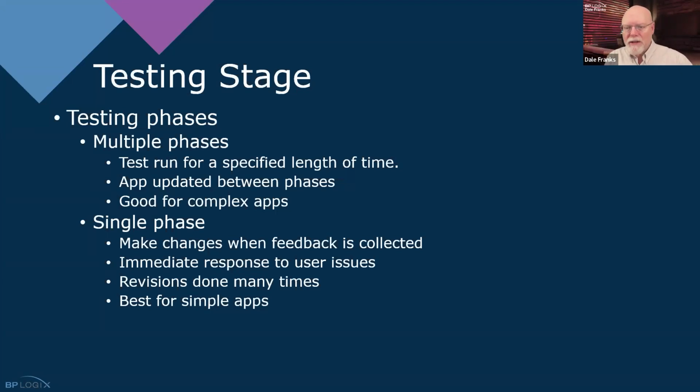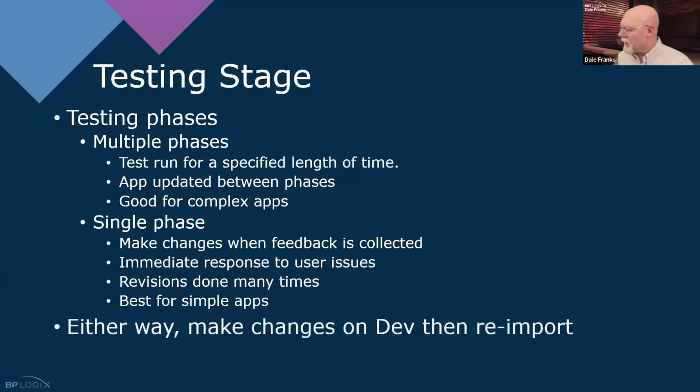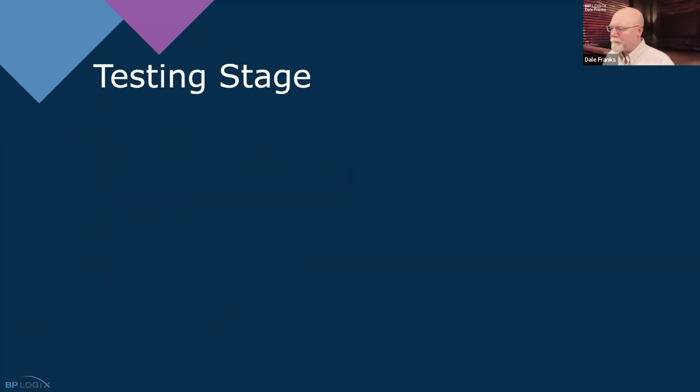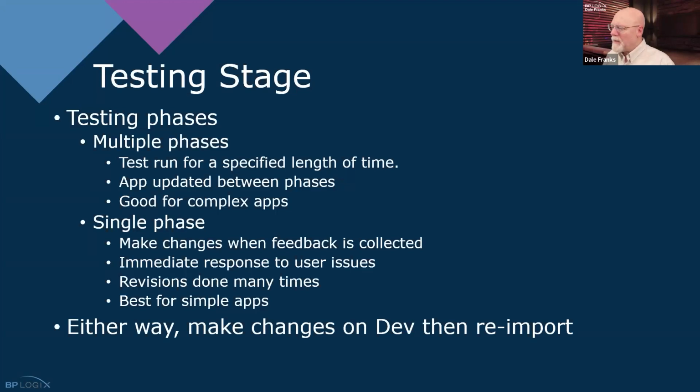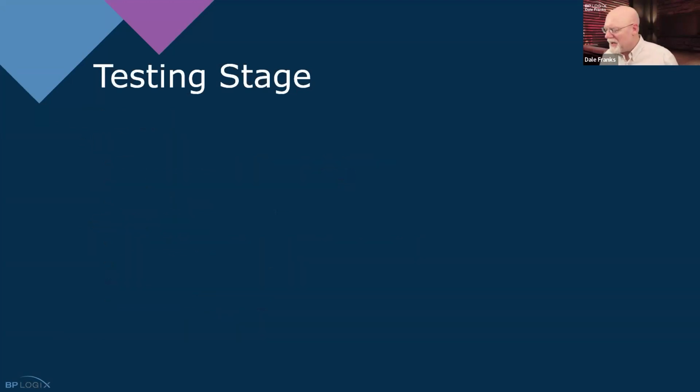So you're just constantly making changes day by day, perhaps hour by hour, changing the thing incrementally as feedback comes in. Either method works. The latter is best for simple applications rather than complex applications. But as it says here, either way, make changes on dev, then re-import. Do not make the changes on production.